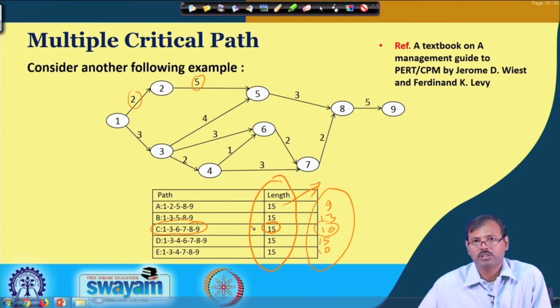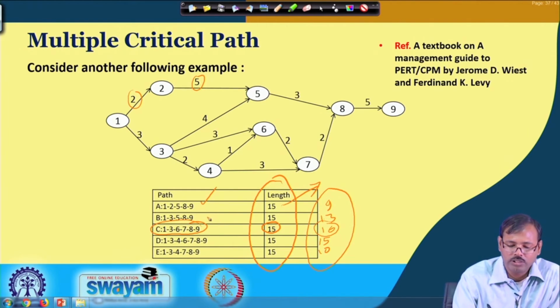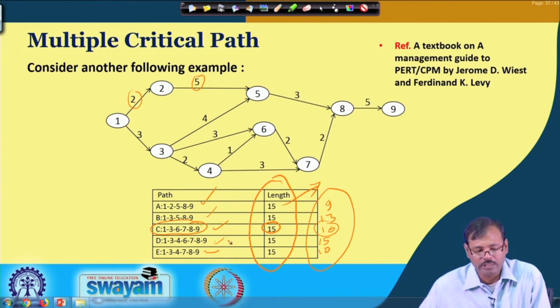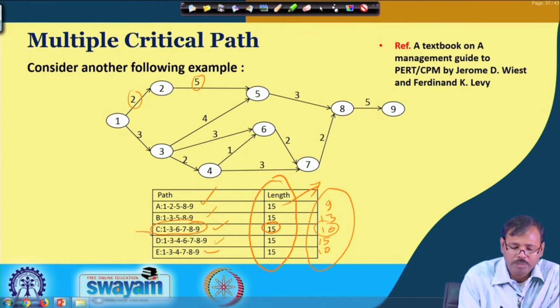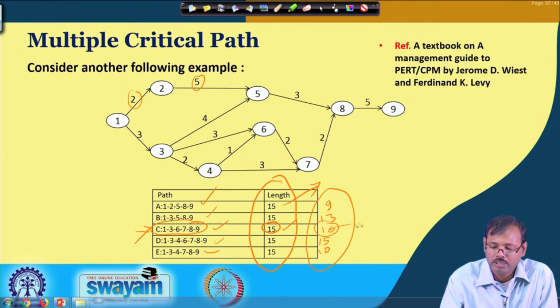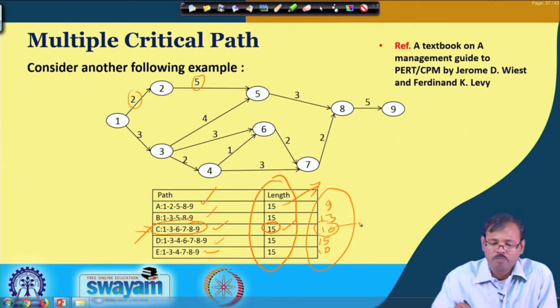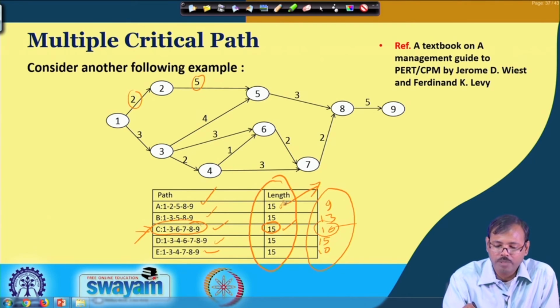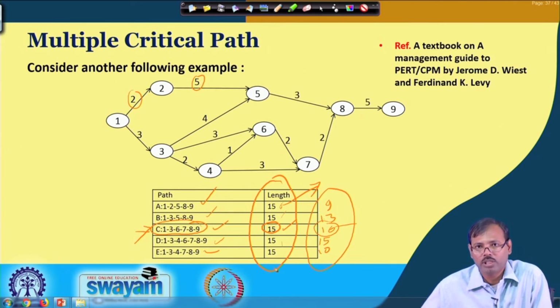Suppose let us consider this is the manufacturing of a TV. Say consider this is the power board, this is the display board, this is the sound box, this is the picture, this is the screen and this is the cabinet etc. Let us consider it like this, these are the ways we are carrying it out. So, putting some additional man and machine in the screen part allows us to complete in 15 hours instead of 16 hours, and we reduce the requirement of man, machine etc. in the other path. So, we are providing a little bit additional, but we are actually saving some amount of money on the costing of this.